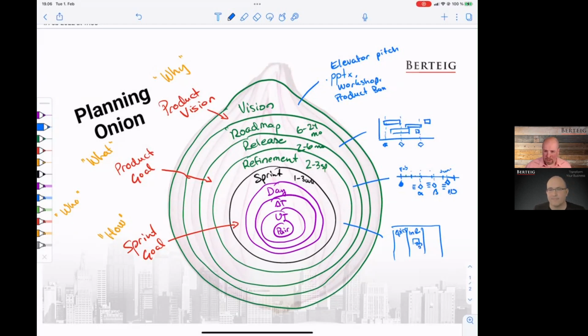In the daily Scrum, the team can pick items from either refinement or from development activities. In refinement meetings, if we have them every week, we populate this table with tasks and open items that we want to do during the next week, probably. And those get thrown here. And then the word you mentioned earlier, ready. The last column is items that we consider, both from the product owner's point of view and the team's point of view, to be ready. We can take this into the next sprint planning or whenever we want to.